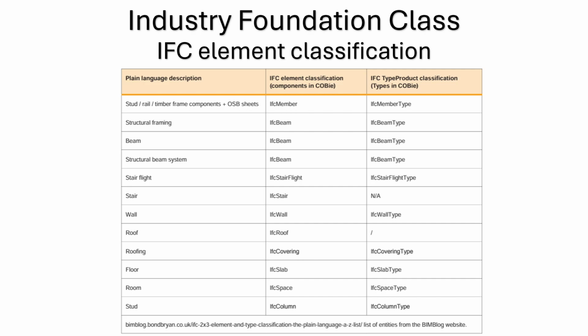Now, facility managers and QSs, they can bring that data into their managing platforms in a text-based format, and they can manage it in a database more formally. But remember, you're not just building a building in real life, you need to build that three-dimensional model for handover as well. So they can then take that model and extract what they need from it in a format that the users need it to be in. Yep, does that make sense? So the naming structure becomes very important.